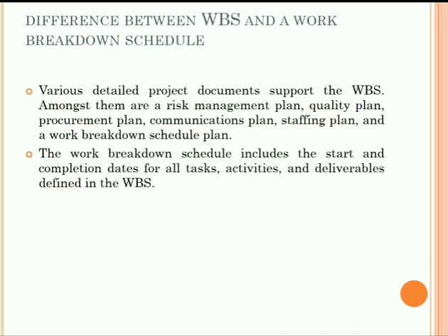Those are the different levels that we are considering for the work breakdown structure. Next we can consider control accounts related to the work breakdown structure. Here the control accounts are used to group work packages and measure their status. They are used to control areas of your project scope. In our example, the execution of project phase could be a control account because it has several deliverables and work packages associated to it. Okay, these are the control accounts related to the work breakdown structure.